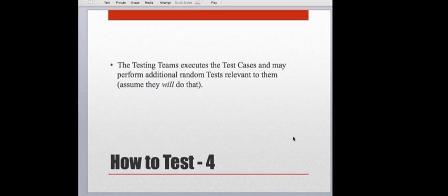In every phase of a project, it becomes more and more expensive to fix an issue, right? So a missed requirement during the analysis phase is not that big of a deal. You're still in the analysis phase. You discover it, you add it, everything's good, right? But as you move into design and then construction and testing and then even implementation and into production, in each of those phases, when a missed requirement is discovered, it costs more to fix it because you're now having to go backwards and do other things, right? And it can affect work that's already been done and cause that to have to be redone as well.